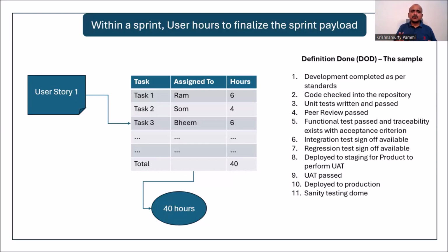In some cases, people voluntarily take them, in cross-functional mature teams, which we will deal with later. But usually on a sprint planning day, the user story is split into tasks, assigned to specific people, and an estimate is made. Keeping an average developer in mind, how many hours it will take, we can come back with an estimate.